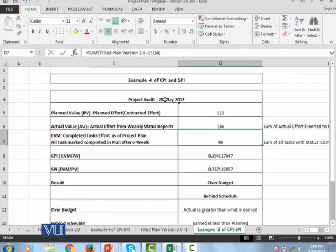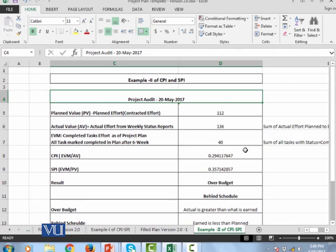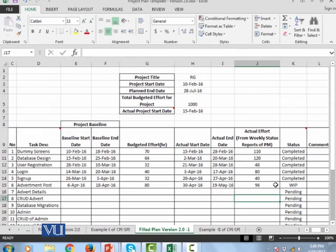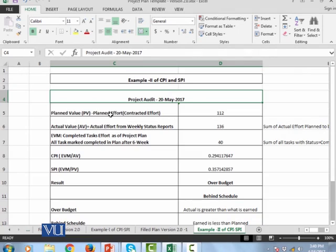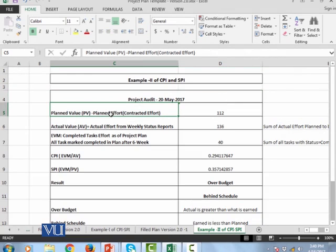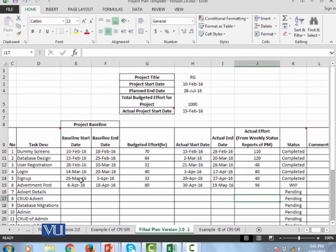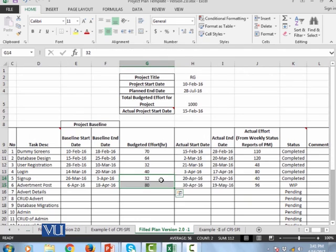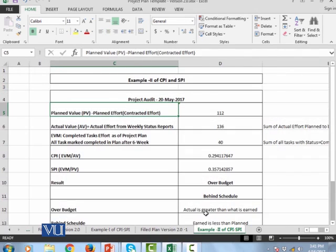Now I want to do the same audit but after one month. So here is my project plan again, which is the planned value of 20 April to 20 May. I have these two tasks, these two tasks are budgeted 32 and 80 which is available.